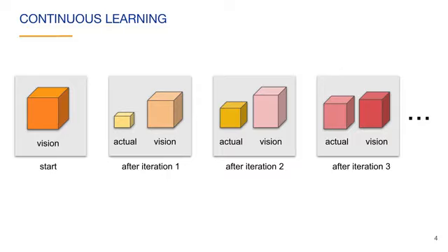The product is then worked on an iteration at a time. After the first iteration, we have some of the features of the product. Even though the product only has a few features, it can be considered usable with respect to those features. That product should have value and potentially can be given to the customer. After the first iteration, notice that our vision has slightly changed. This is because we have learned from implementing the first product features and adapted our vision accordingly.